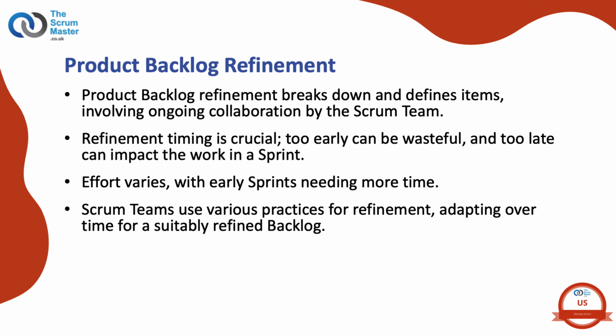The amount of effort required to refine a product backlog can vary widely and is not set by Scrum. In early sprints, this effort may be higher as the Scrum team works to detail the work required to build the product at a low level of detail. In later sprints, less time may be needed as the Scrum team understands more about the domain and the product and how they work together, and the volume of new work entering the product backlog may be reduced.